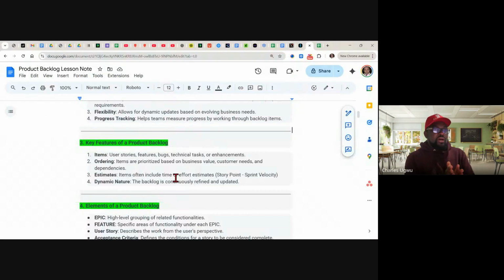If the developers have been working on 50 story points for a period of 2 months, and all of a sudden, the developers want to start consuming 70 story points, the Scrum Master will say no. You need to explain why all of a sudden you want to start consuming 70 story points, because it's beyond their capacity, and you will not allow them to do that.